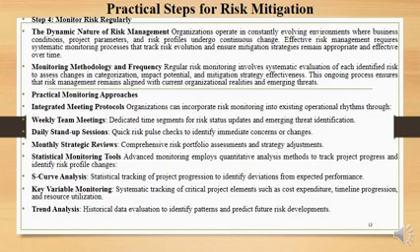Regular risk monitoring involves systematic evaluation of each identified risk to assess changes in categorization, impact potential and mitigation strategy effectiveness. Practical monitoring approaches include integrated meeting protocols: weekly team meetings, daily stand-up sessions, monthly strategic review, and statistical monitoring tools. We have the S curve analysis, key variables monitoring system and tracking of critical project elements such as cost expenditure, timeline progression and resource utilization.